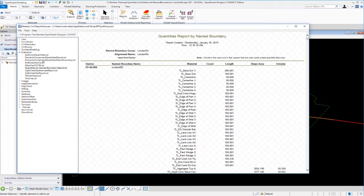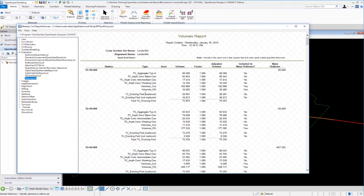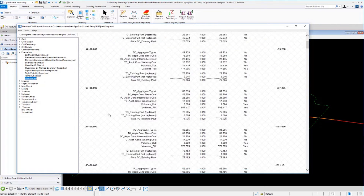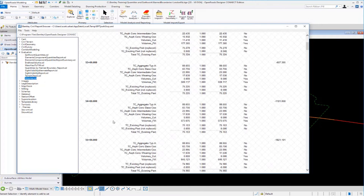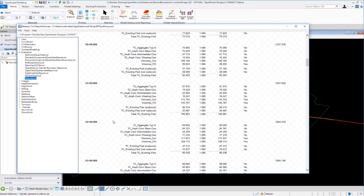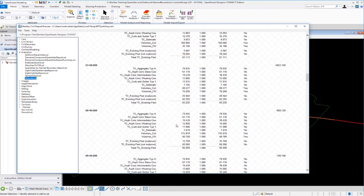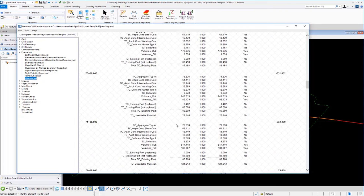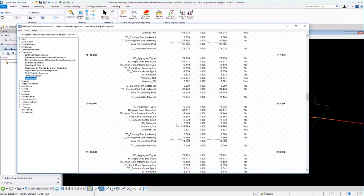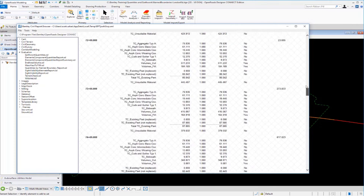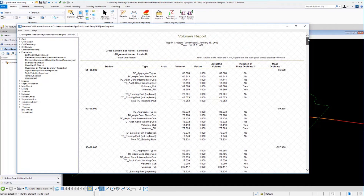Using the volumes.xsl style sheet provides a detailed breakdown over every station range and named boundary shape. Named boundaries are very useful for slicing and dicing or dividing your model based on station ranges and offsets. They can be created any way you like, anywhere along the alignment — a very good way to break up your project for reporting purposes.